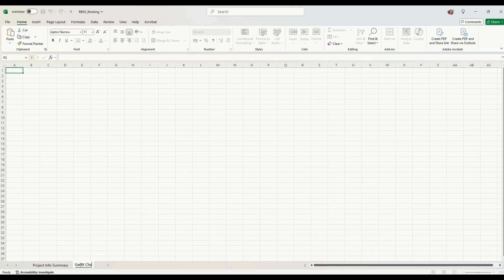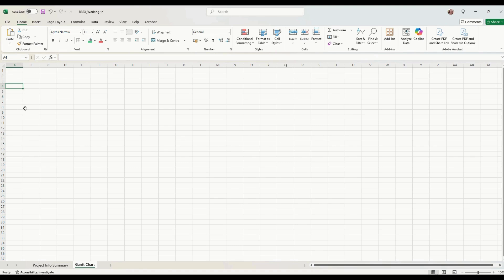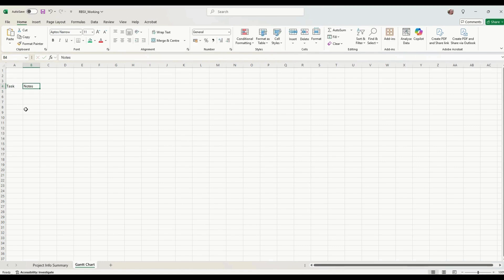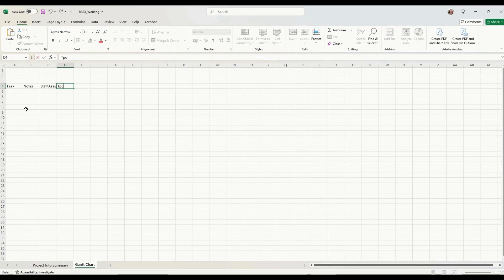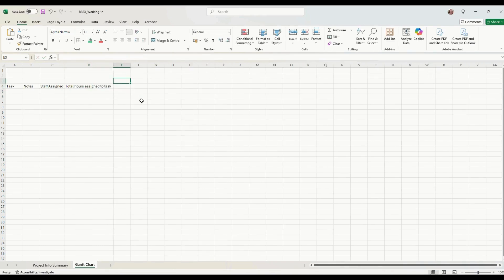We're going to set up the Gantt chart on a new tab called 'Gantt Chart'. In there we want to put our tasks and list them, along with some notes about the tasks — particularly useful for the rationale, so we can write down why we've put a task in that order or what the task is about. We also want to know the staff assigned and the total hours assigned to that task.